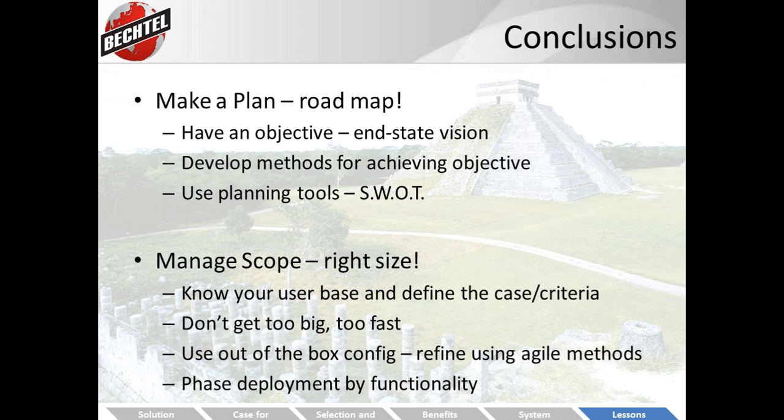You've got to show them what kind of value they can get out of it that they're not getting today. Whether that be from an efficiency standpoint, you can put together a business case: we estimate X number of hours or man years creating these reports across the 100 projects that we have in our organization. If we spend Y number of man years to implement a system like this, you can get some push button reporting, essentially, that would be a good return on that investment. So you've got to make those business cases.